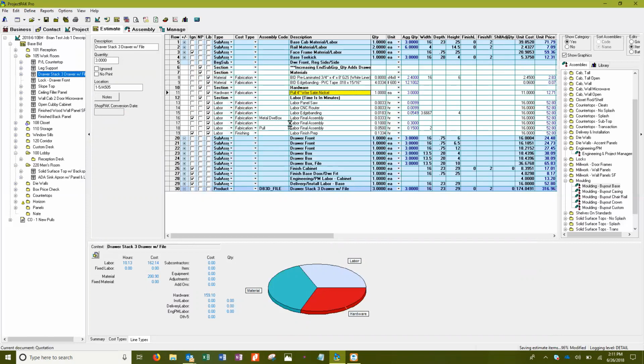We can't believe it's $4,000 for pulls. Can you give us your normal pull? Well, your normal pull costs 55 cents. Are you going to go and open every one of those specs and apply it? No, you're going to find one, double click it, put your 55-cent one in, hit it at the very top, and boom, you're going to pull out $4,000 really quickly.